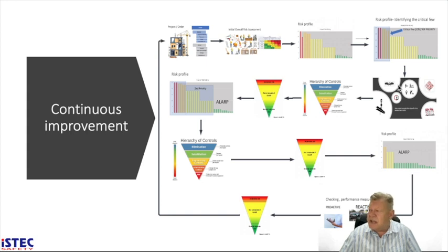Based on the high risk issues, we now do specialized risk assessments on hazardous chemicals and all the fatal risks. Based on what we find during our analysis, we then apply our hierarchy of controls. We need to eliminate the hazard. We need to substitute the hazard with something.